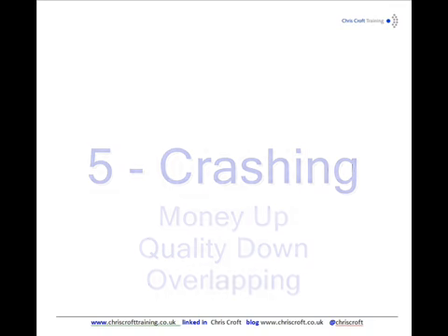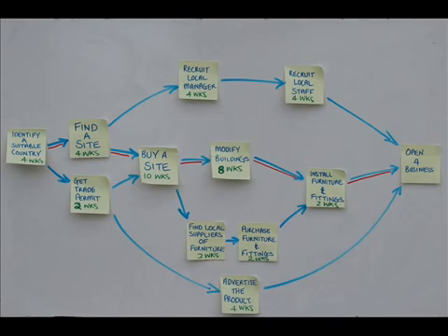And by the way, the ones that you need to crash obviously are going to be the ones on the critical path. No point in crashing a floating task. You have to keep an eye on the floating tasks though, because if you shorten the critical path enough, some of the floating tasks may then become critical. So, you've produced the network diagram without thinking about the total, and then you've looked at the total and reduced it if you have to.